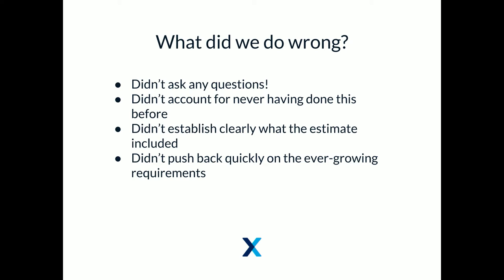And I think once you start heading down that path, it can be really hard to catch much later. You have to kind of nip it in the bud straight away and say, hang on a minute, I understand that this wasn't clear, but what we're actually estimating was just adding the module. Anything that we need to do further than that, we're going to have to discuss that.